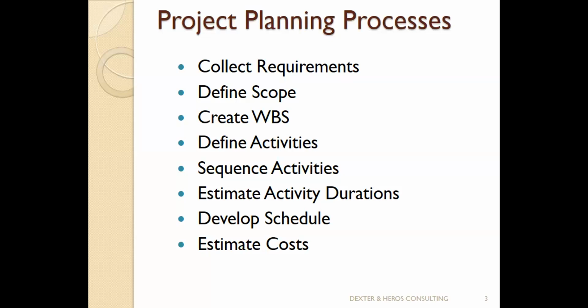After this, the next one I will execute is this. We arrange it in order of execution. Once after that, you now ask yourself, what duration? What are the durations for each activity? Yes, you estimate the duration for each activity. Though before estimating duration, we need to estimate resources first.